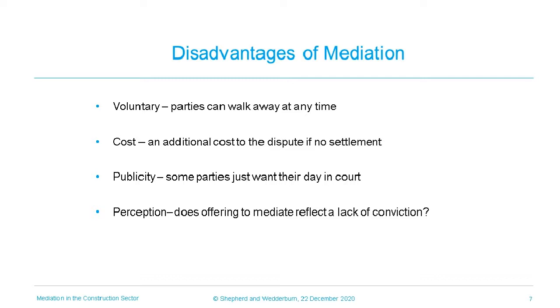Costs can also be a drawback of the mediation process. If the mediation ends unsuccessfully, the costs incurred, although reasonably low, are still payable in addition to all of the other costs of progressing the dispute. Mediators' fees are usually paid up front and equally between the parties. Unsurprisingly, there is no cost recovery from the other side unless that is the agreed part of the settlement. However, it bears repeating that this drawback can be used by the mediator to encourage reaching a settlement.